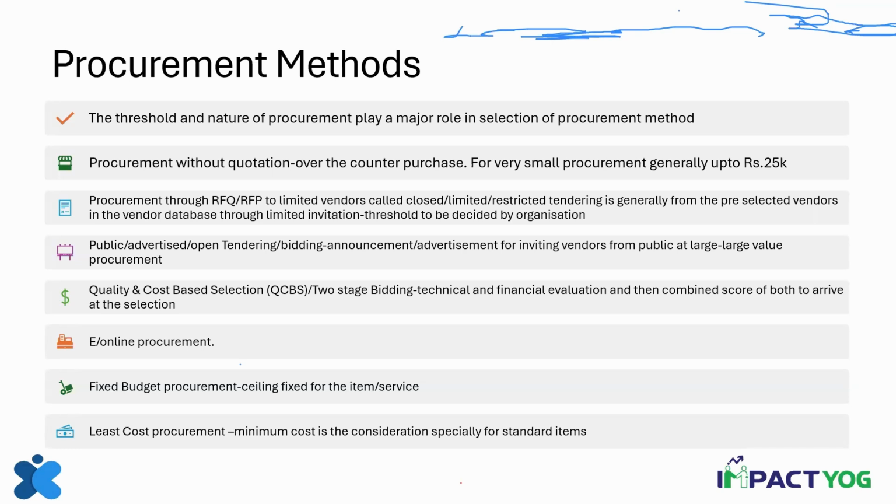So this is a very normal method of procurement, where services have to be procured or goods have to be procured which are technically customized goods, not standardized goods. Now, why do we call it two stage? Because here we first will understand the quality of the proposal. Is the proposal addressing our need in terms of the technical quality?